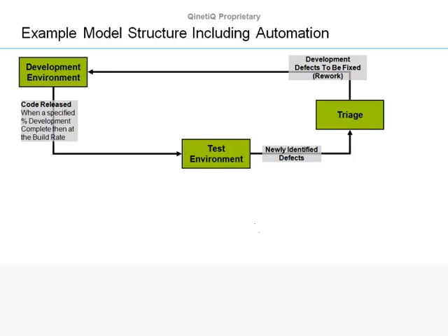So we have code which is developed in the development environment. They'll reach a point where it's time to start doing the testing. In a classic waterfall software development cycle, you'd wait until all the code is developed the first time. In agile, you'd have a point where, say, 50% of the code is developed before you start doing the testing. That code is then passed to the testers to start running the test cases.